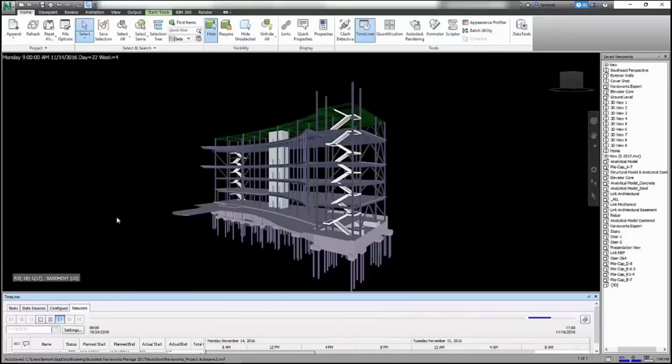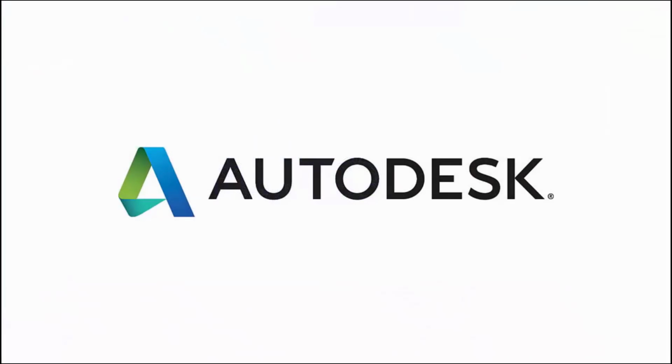scheduled tasks. With Timeliner, you can also link the objects to tasks in an external scheduling file and synchronize the simulation with the actual status of the project. Actual and planned dates can be associated with the tasks, simulating actual against planned schedules.